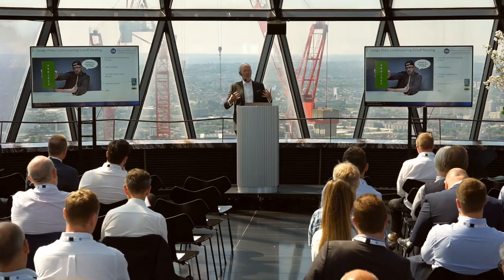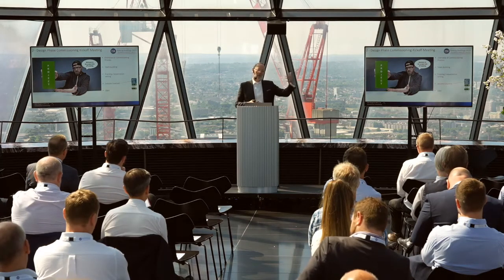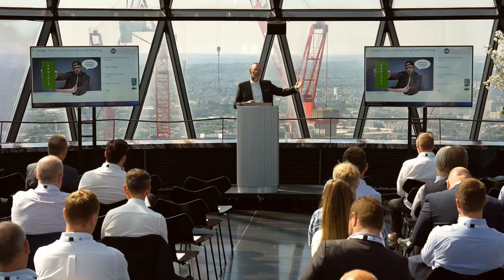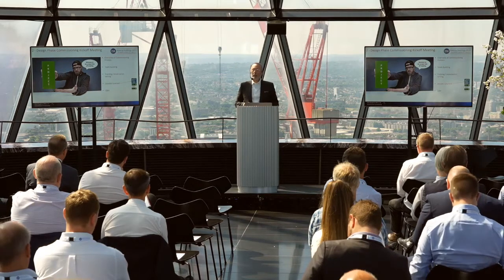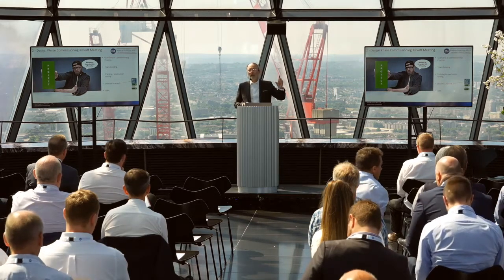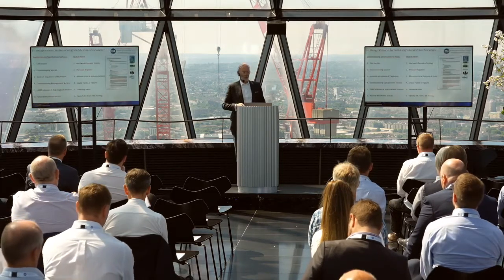educational, and the idea is when everyone leaves that meeting, there is a common understanding and agreement on what is in front of you. So you're not getting big fights halfway through the job about who's doing what when. This takes half a day or a day and adds a great deal of value to the job, right? For not a lot of cost.